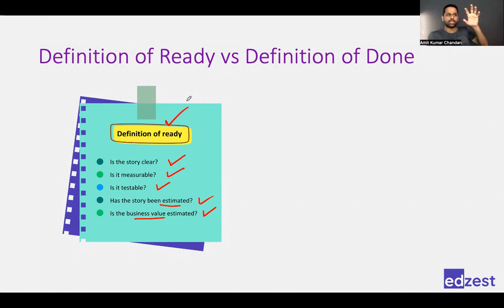And you will check all these points for every single user story before development, so that there is absolute clarity. It doesn't matter who is doing it. It doesn't matter who is going to develop it. They will all have at least this bare minimum information available, which will not hinder the progress while they are working. It should not happen that they have started and they don't know what the story point is, or they're not clear on the user story. Right? Whoever is starting from the team.